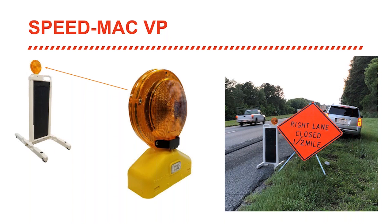The general specification around how we want to lay down data or deploy devices is every 100 to 500 feet to capture the best data possible. And that's capturing either Bluetooth data and/or capturing radar and speed data through the construction zone as well, leading up to and exiting.